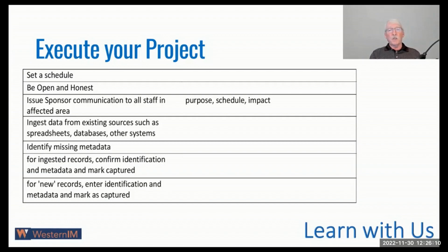Ingest data from existing sources. So if you've got, like everybody else, tons of old spreadsheets of information, you might want to ingest all that information into the tool first of all. Pick whatever you've got and bring it in and line it up so that, if you had 2 or 3 different kinds of spreadsheets with different metadata styles in them, all of it comes out looking the same when you ingest the information.